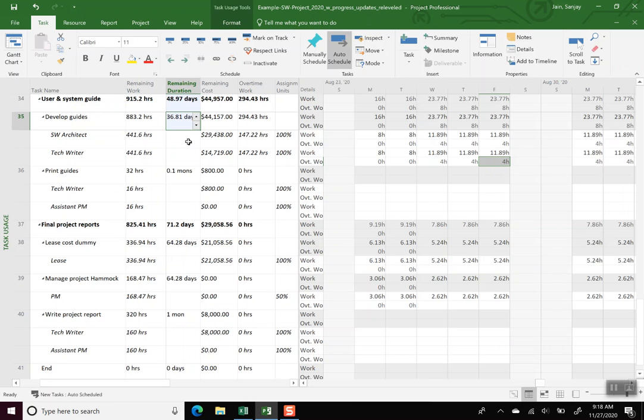But even before overriding, you notice that value was kind of close, 37 point something, while we are at 36 point something. And we make this adjustment to make the overtime work numbers work well. So that's for an activity which was in progress. And so we are just doing that modification for the remaining duration. Let's talk about the case of the other activity, 40, down here.